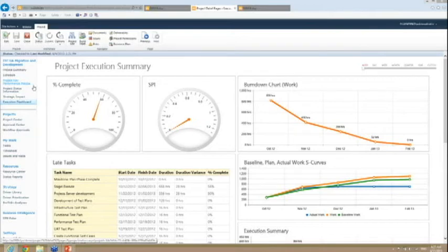EPM-PAL supports workflow, and by that I mean you might have a workflow for your organization, and on every stage of your workflow you can display different dashboards for your project. If it's on initiation, you can display some information. If it's on planning, you will be focused mostly on resource plan and resource availability and not on the schedule. When it's on tracking, on execution, you're interested to see your burn down chart and your actuals